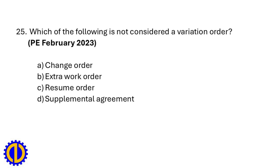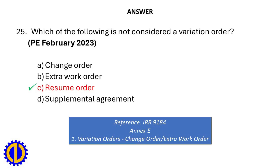Which of the following is not considered a variation order? a. Change order, b. Extra work order, c. Resume order, d. Supplemental agreement. Answer: c. Resume order. Reference: IRR 9184, Annex — Variation Orders.